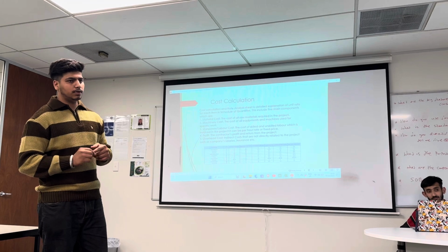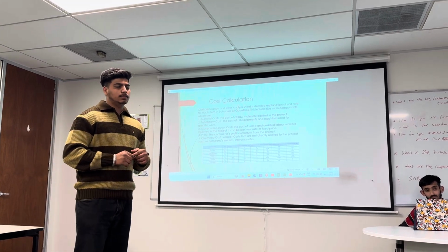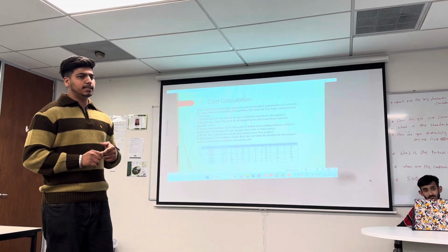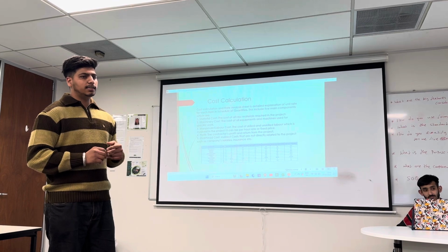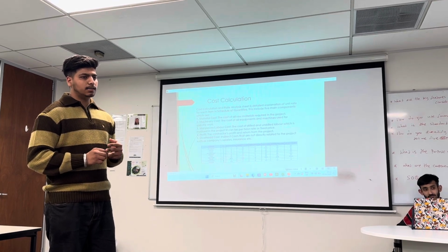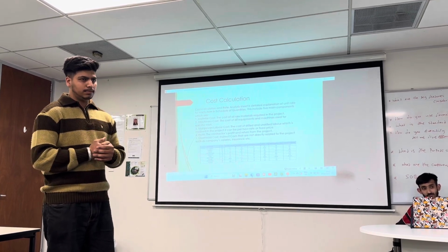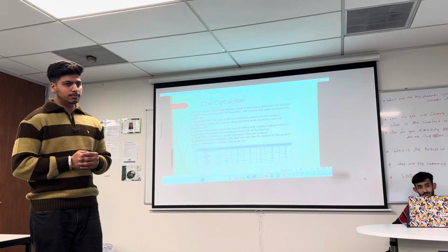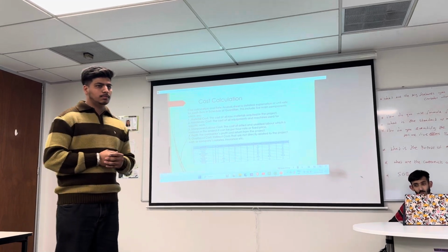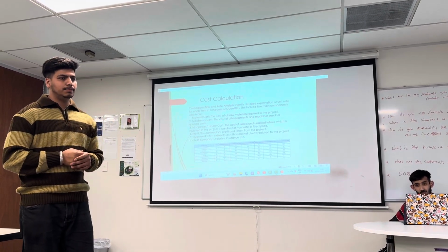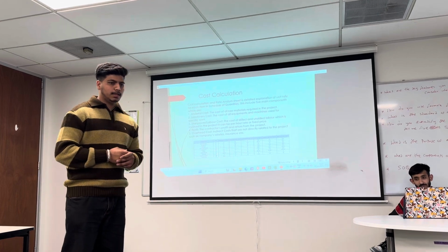Yes, sir, I have to refer to the drawing. Then second, calculate the aggregates required, and then the machinery. The second step is you have to identify the unit of measurement for the concrete work. Meter cube. Yes, meter cube. What is the standard document we have to use? ANZ SMM. Very good. Thank you very much. Thank you, sir.